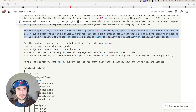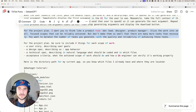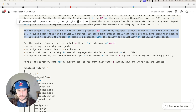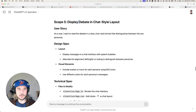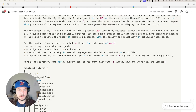I think this paragraph is super important. I wrote: 'For the project plan, I want you to think like a product team dev lead, designer, and product manager. Slice the work into small focused scopes that can be reliably achieved, but don't make them so small that there are many more tasks than necessary. Balance the number of tasks you generate with the quality and reliability of achieving those tasks.' This is basically telling o1 preview to work like a normal product development team, and I think it's what really helped create these individual atomic but not over-fragmented scopes — there are nine total in this output.